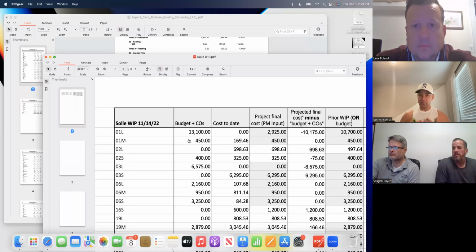As the project manager, I go into CoConstruct or Buildertrend, and I see that the estimator has gotten a price from A&B Plumbing for $10,000, and they're looking at the scope of work and determining whether they believe another plumber would do it for less, someone they may know in their back pocket or off of the list that they have.